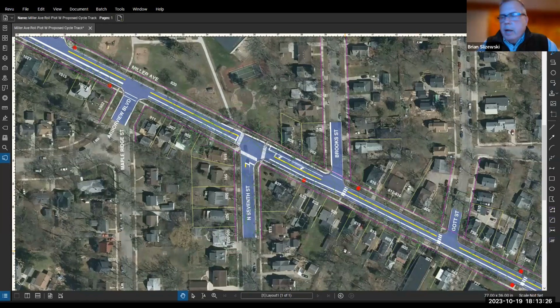We are probably looking at actually having to remove some of the trees and maybe do something with some of the utility poles on the south side. It's not been determined exactly how that's going to be accomplished yet, but I just wanted to bring that up to everybody, that that is something we're going to be seriously looking at in order to accomplish the goals of the project, to get the cycle track in continuously out to Maple Road and also accommodate the existing configuration of the traffic lanes. So a significant challenge there, working within, again, a fairly fixed, narrow right-of-way.